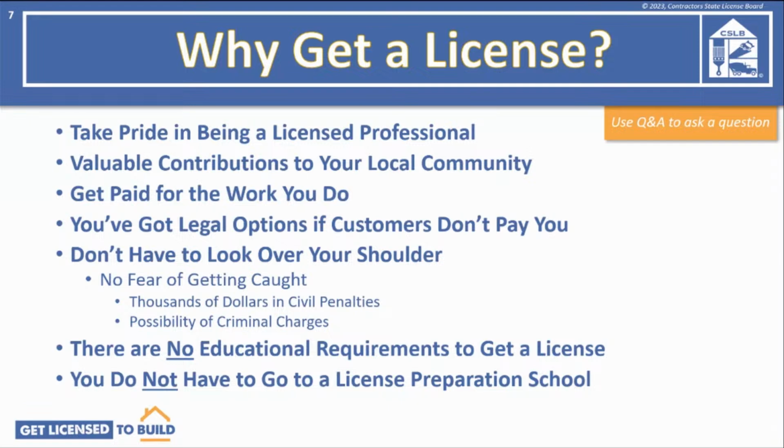Next, it allows you to get paid for the work that you do. There is value to the work done by a licensed professional. Being licensed also gives you legal options if customers don't pay you. Unlicensed contractors do not have a legal right to take someone to court to get paid, because the work required a license and they were unlicensed to do the work in the first place. Also, you would be able to use the mechanics lien laws.